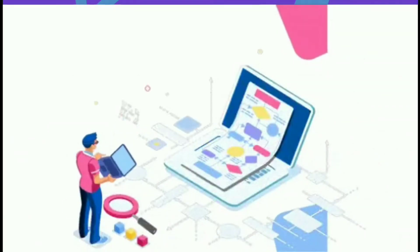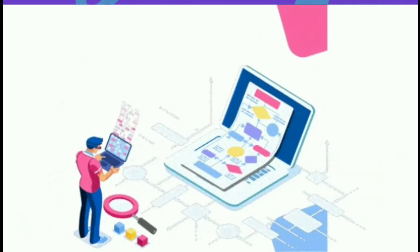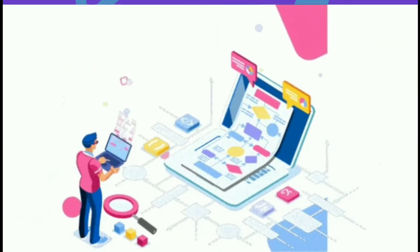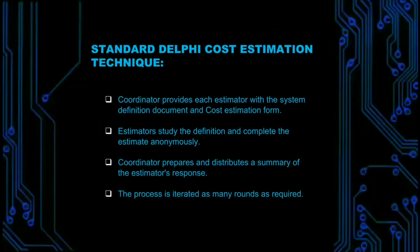Delphi cost estimation is a top-down technique developed at the RAND Corporation in 1948 to gain expert consensus without the adverse side effects of group meetings. A coordinator provides each estimator with a system definition document and cost estimation form. Estimators study the definition and complete their estimates anonymously. The coordinator prepares and distributes a summary of responses, and the process is iterated over as many rounds as required.